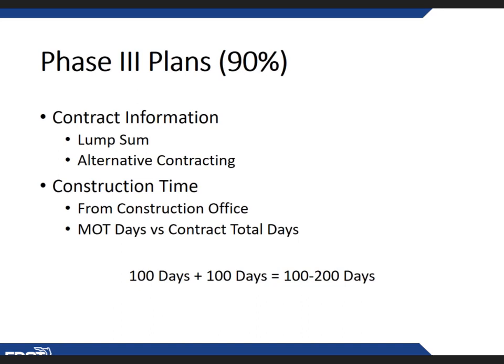In getting back to how projects are let in the department, we have the proposal. So when you have multiple projects on a proposal, like a goes with or strung projects, you may have heard those terms. That's what we mean when we say multiple projects on a contract. Always verify the combined contract days with the district construction scheduling engineer.